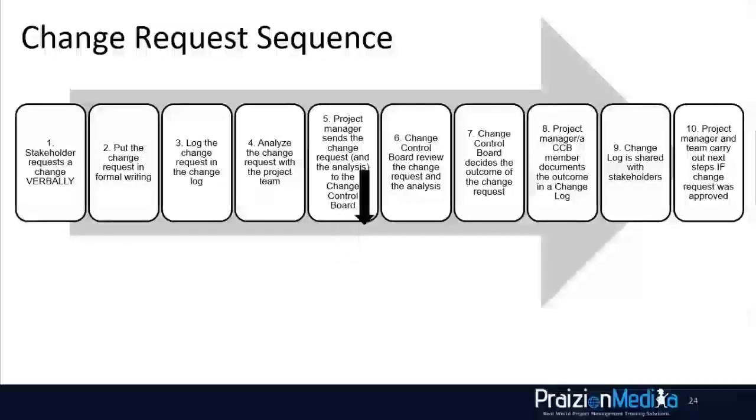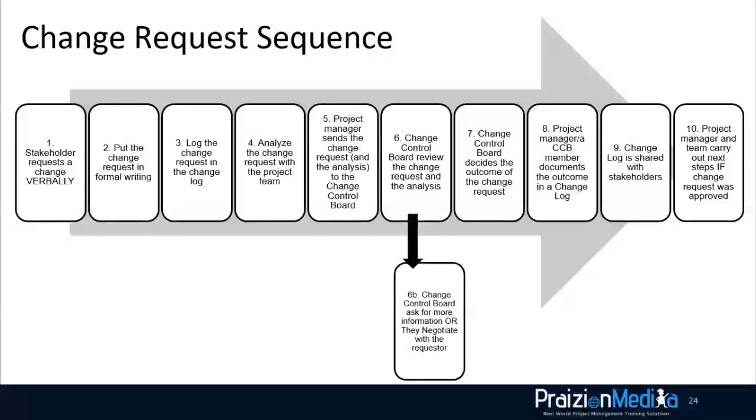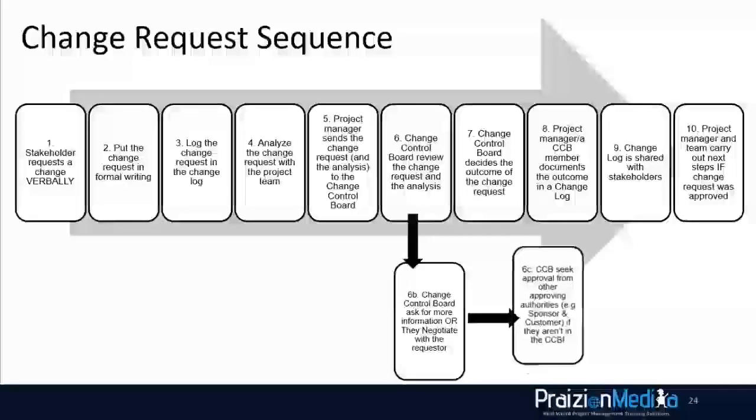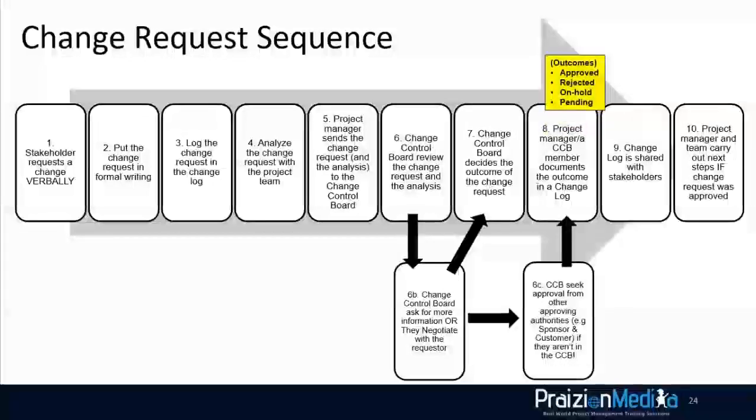But bear in mind, you could also have a diversion at point 6 here. The change control board could ask for more information. They could negotiate with the requester for something similar, but not exactly what they asked for in the beginning. Also bear in mind that the customer and the sponsor may not be part of the change control board, and therefore you need to get them involved. And when that's done, you anchor back into the main flow and you decide what is the outcome: approve, reject, put on hold, or pending status.